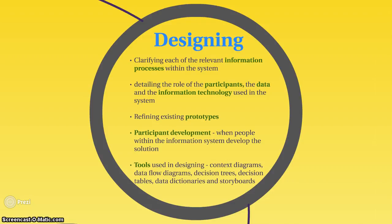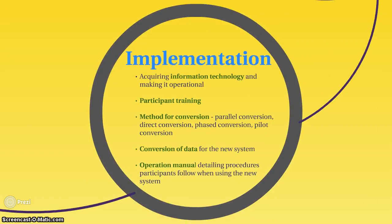Once the solution has been designed, we need to implement it — thinking about how it will be put back into the organization. We must decide how data will be converted and which conversion method to use: direct conversion, where the new system takes over straight away; parallel conversion, where the old and new systems run side by side; phase conversion, where the new system is gradually implemented; or pilot conversion, where a certain department uses it first before others adopt it.